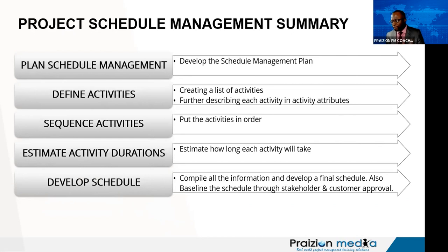But the schedule baseline, oh, good, they put that first. That is big. Your schedule baseline is going to be used to measure. You see what I'm saying? It is the basis that you're going to use to measure your performance, to measure your schedule performance. So the schedule baseline is big. And then if you're looking at page 205, in the outputs, the next thing listed is your living, breathing schedule.